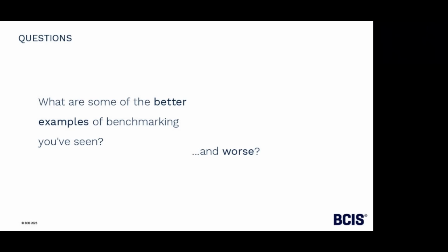We had to go and interview them post completion of projects to try and understand what happened with costs. And by doing this, we came up with what we were classifying as a cost driver crib sheet. So all the sort of things that would appear on a project which would impact on the cost. That might be things that could impact on the scope, things that they could be aware of when they're going out to sites.